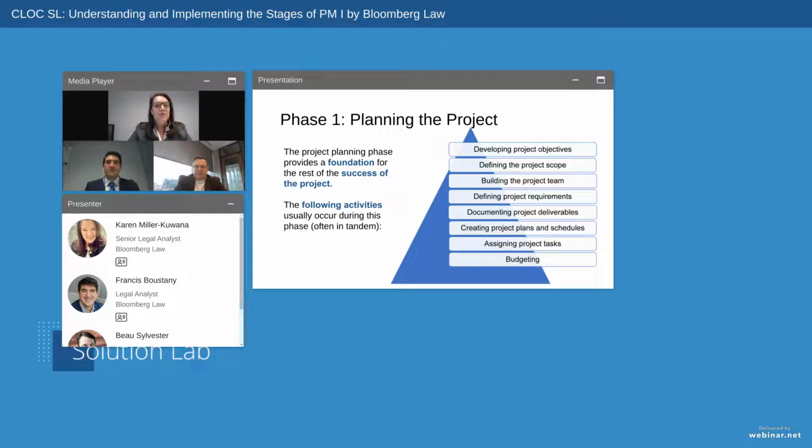The project or matter should be triaged and often classified. During this time, you can look at the risk and priority profile for the legal project and determine where that lands. Assign any subject matter expertise you need, and then also make sure you have a really good understanding of what resources you're going to need for the legal project or matter, including whether you need external resources such as outside counsel or vendors.